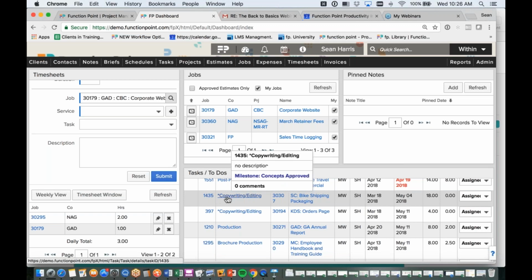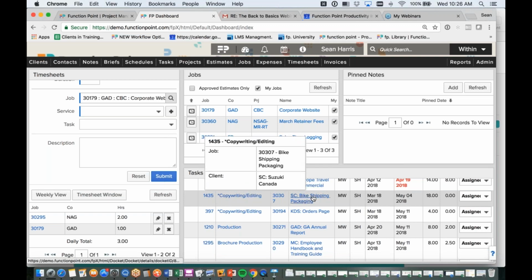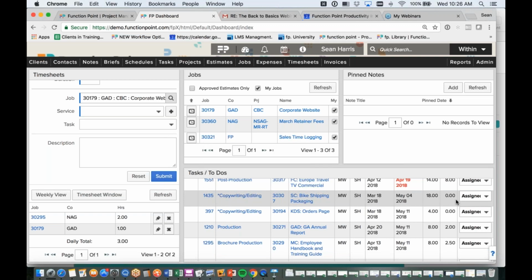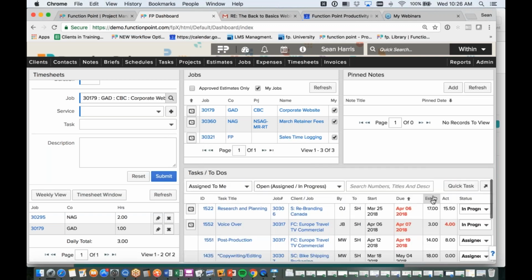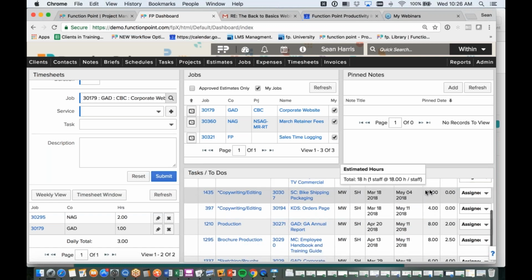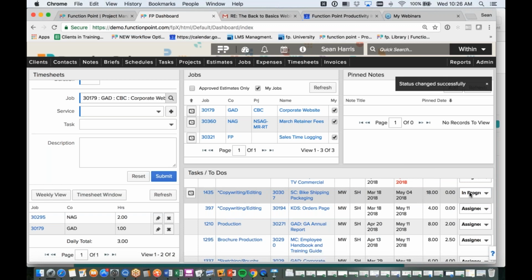Let's say that I just started working on this copywriting and editing piece. It's on my task and to-dos list. I know there's 18 hours estimated for that task, and I haven't done anything yet. So maybe I spent the morning working on this copywriting piece. What I'm going to do is move my task to in progress, which is letting my team lead know that I've actually started work on this.